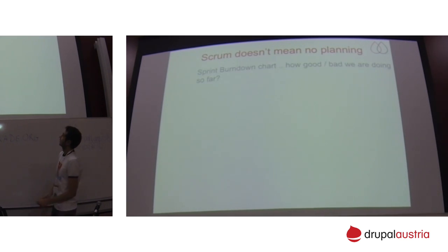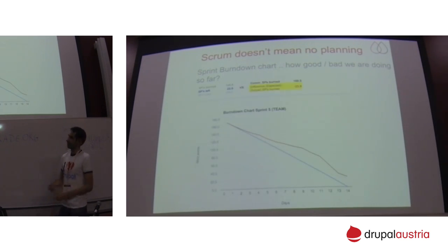Yes, I really like the question, how are we going so far? Are we delayed or are we on time? So yes, I'm using this one, it's a Google Sheet again, a template that I used and worked with. As I said, we are using Jira, but unfortunately in Jira, in order to burn the story points in the burn down chart, you need to close the parent ticket itself. But as you have seen before in our flow, the ticket is only closed once it goes through UAT. And if the client has limited resources doing UAT, then you might have troubles. Then the burn down chart is going to be something like this.